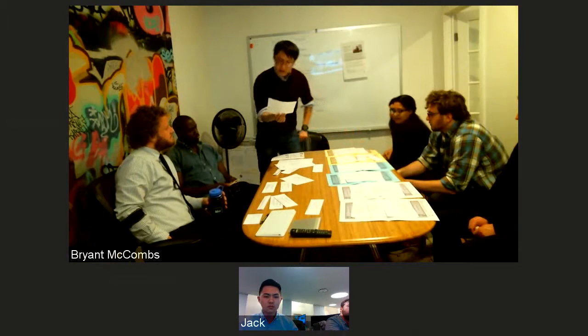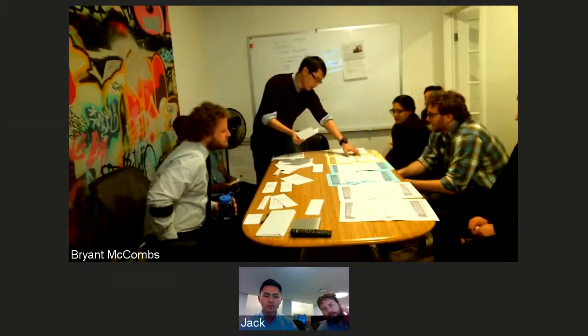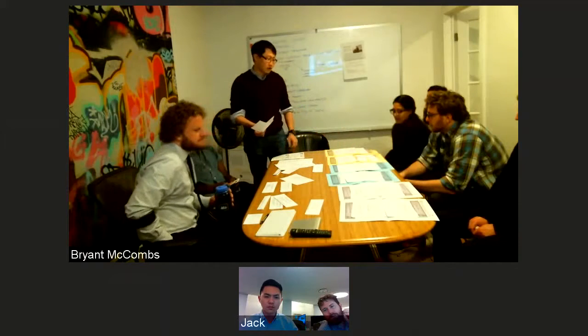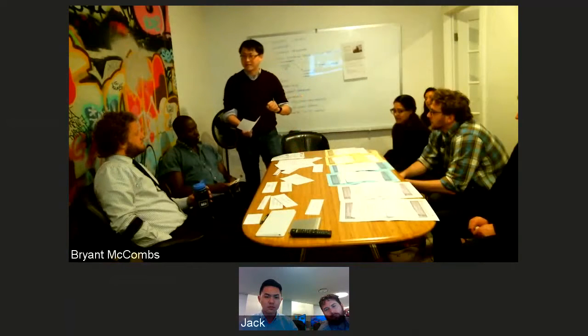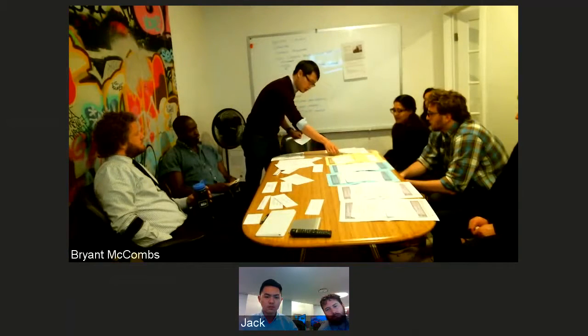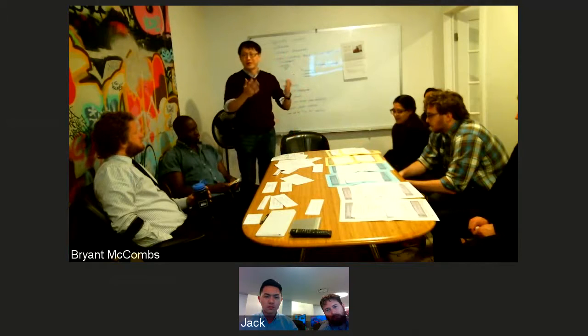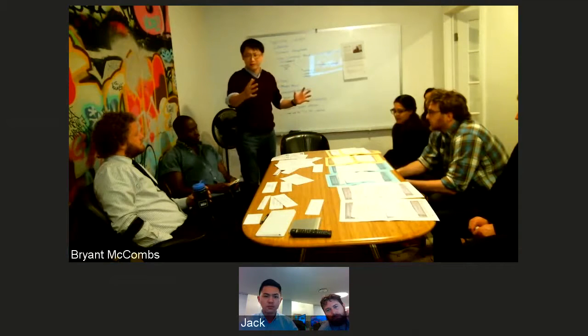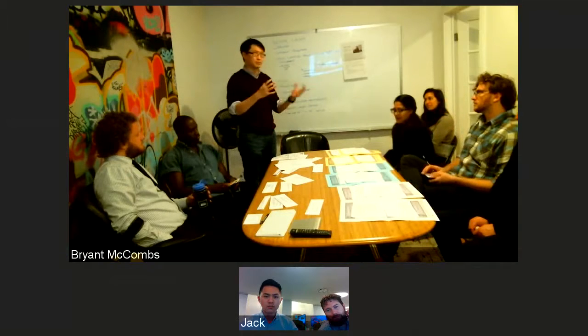So, okay, is a map for invitations more important than the ability to add a guest to your wedding registry or to view a guest list summary report? Well, maybe not more important than adding a guest, but maybe more important than the summary report, but you still don't have enough time yet. So maybe we don't need to print mailing labels, and we can move this over here. And voila, you've changed your plan. You haven't bloated your budget because this isn't scope creep, this is actual planning.